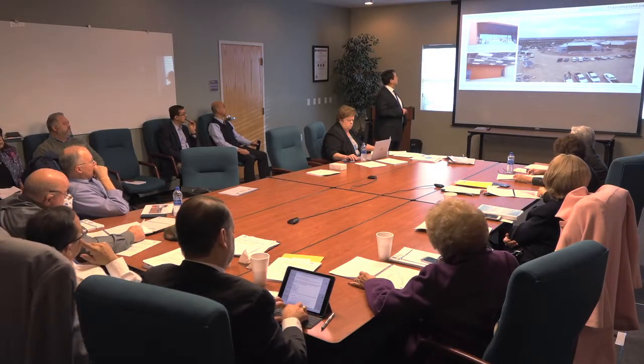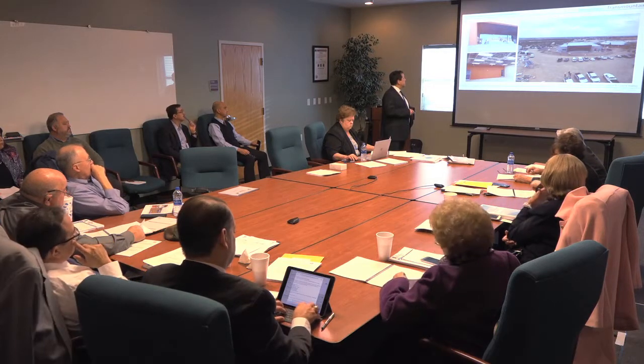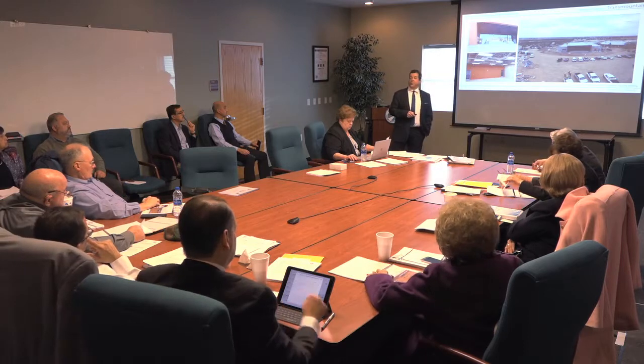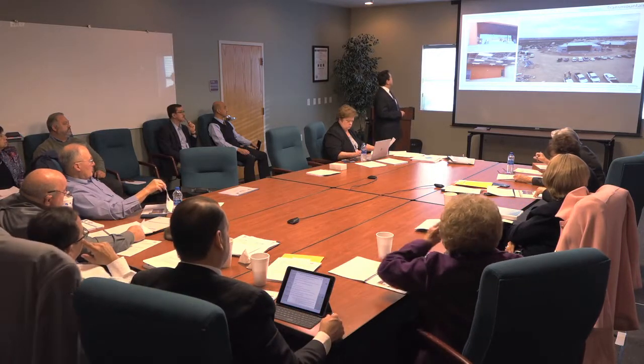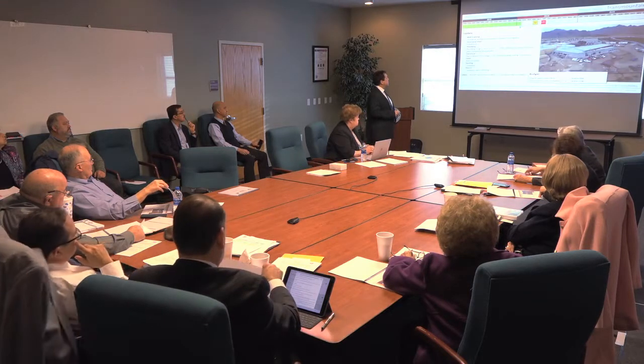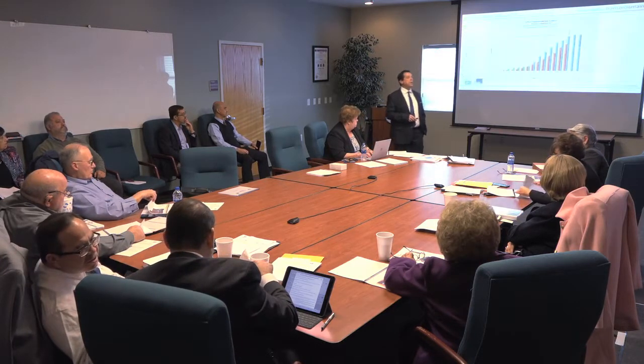And Trans Mountain, finally, the last project. This one is ready to complete just 2 weeks before Viator at DPC. As you can tell, on the exterior they're almost done. They just need to paint the exterior. All the plumbing, roof-in and top-out, everything's 100%. HVAC is 90% complete. The roofing company's work is complete. All the structure is complete. And right now, the insulation and the sheetrock inside is in progress.